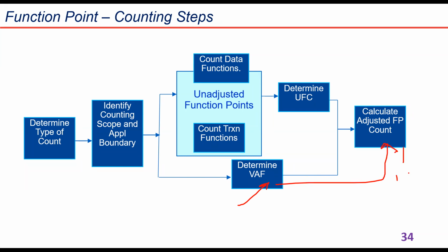On this, you will need to apply the productivity numbers. So whatever is the productivity of your team, that okay, they can deliver, let's say, 2 function points in 1 week. I'm just taking a hypothetical example here. Based on the total function points, you will come to know approximately how much time they will take to deliver, let's say, 1,000 function points. So this is another interesting technique we have.